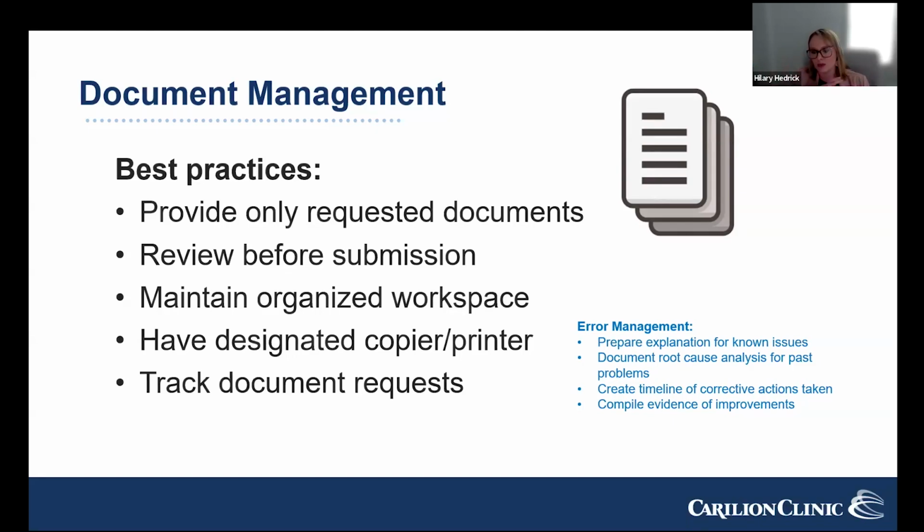You're documenting the root of it, you're creating a timeline of corrective actions taken. Even our office personally, we like to see what timelines were done and the corrective actions that have taken place, and then compiling evidence of improvement. That is good information to know: you've recognized errors, you've taken care of them, and you've documented it.